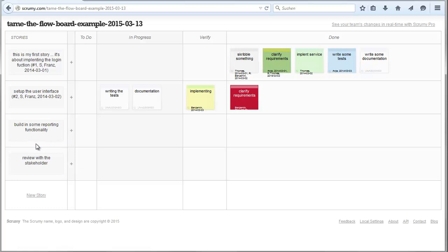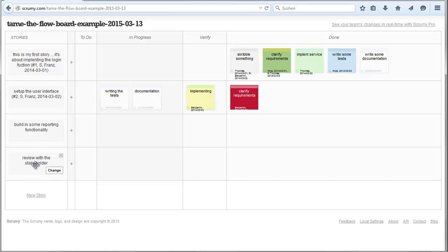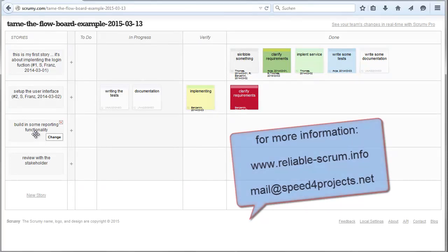In this case you will have three cards in this work in progress area. If you have three developers, everything's fine. The goal is always to keep the amount of open subtasks as low as possible. In the case someone can't work on here, it's allowed to open the next story. This opening of the next story is typically done together with a person that's responsible for the backlog, the full kit manager. In this case someone opens a new story, the full kit manager or senior developer just has a look whether it's really well defined. Typically he does not check just the next story, he also looks at the other stories that are on the board so that in case something is finished, a good prepared story is available.